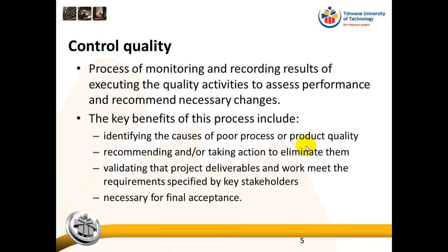The key benefits include identifying the causes of poor process or product quality, recommending or taking action to eliminate them, validating the project deliverables and work that it meets the requirements specified by the key stakeholders, and it's necessary for final acceptance. So quality control is an internal process according to how we see it from the project management perspective, and it is to make sure that the product that we are delivering to the client is ready for final acceptance.